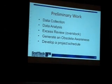Develop a good project schedule. Develop a realistic project schedule. So many times corporate folks will say, okay, we've approved the contract, we've given you your CAR, we've given you the money to spend. We want it spent in 6 months, and if that's not a realistic time frame, you've got to push back on those folks and say, listen, we can't do this in 6 months.